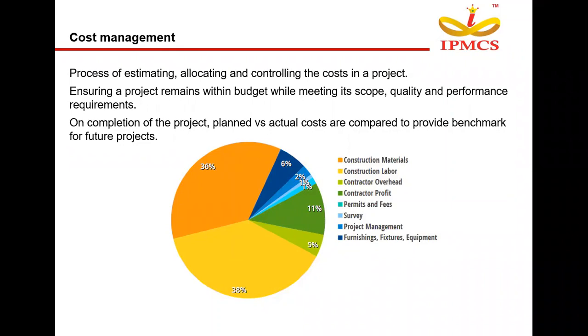Once a project is completed, we have to do a comparison of the planned versus actual cost, and this comparison will be done at each and every milestone of a project. At the end, we'll get a cumulative comparison of planned versus actual cost, and this comparison helps us provide a benchmark cost for our future projects.